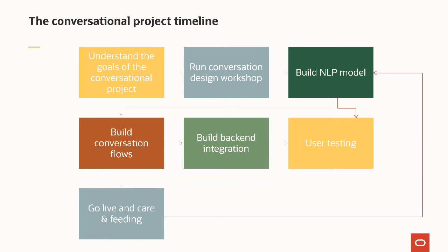Example, the one that Grant was mentioning about ordering, where is my order? That's high priority, low complexity, massive return, fast. So that's a clear use case that obviously will be on the top of the list. So do these brainstorming sessions, get a couple of use cases.